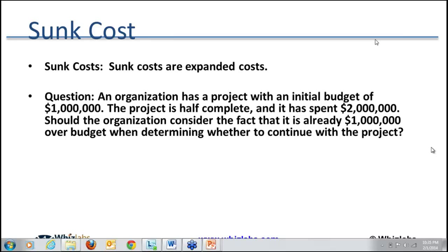So after the project has been initiated for $1 million, it has spent an additional $1 million, but that should not be the criterion to stop the project, because it may have some other constraint or value attached to it, which may have greater value than the cost. As I said, there may be a government regulation, or even if we complete the project with an additional $2 million, I am still able to get my return on investment in 6 months or maybe in 8 months.